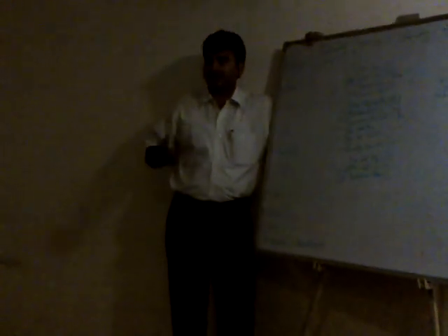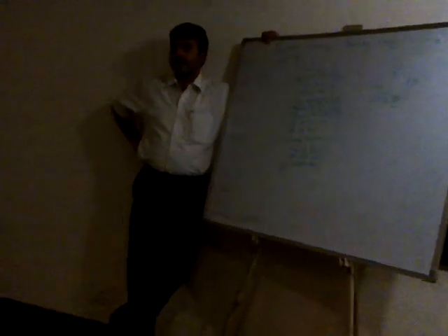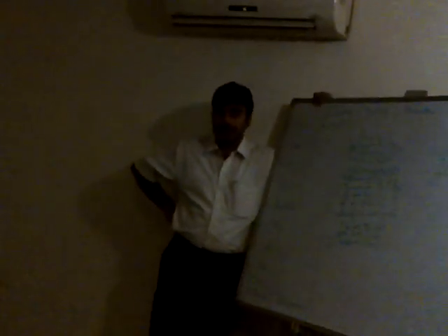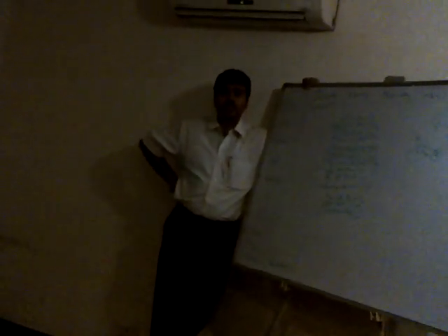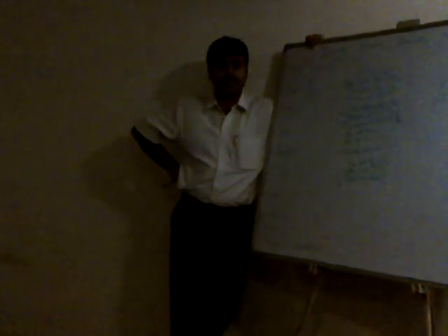Now what has happened? You have arrived at the budget, and when you were estimating the cost, you also looked into the human resource plan and the risk register. Now why is it that you looked in the human resource plan? Because the human resource plan tells you what profile of people you would be requiring, when would you be requiring the profiles, how long would you be continuing with the profiles, when would you be releasing the profiles, and the risk register also. What are the potential risks that you have in your project? So you also need to have adequate buffer for the same.